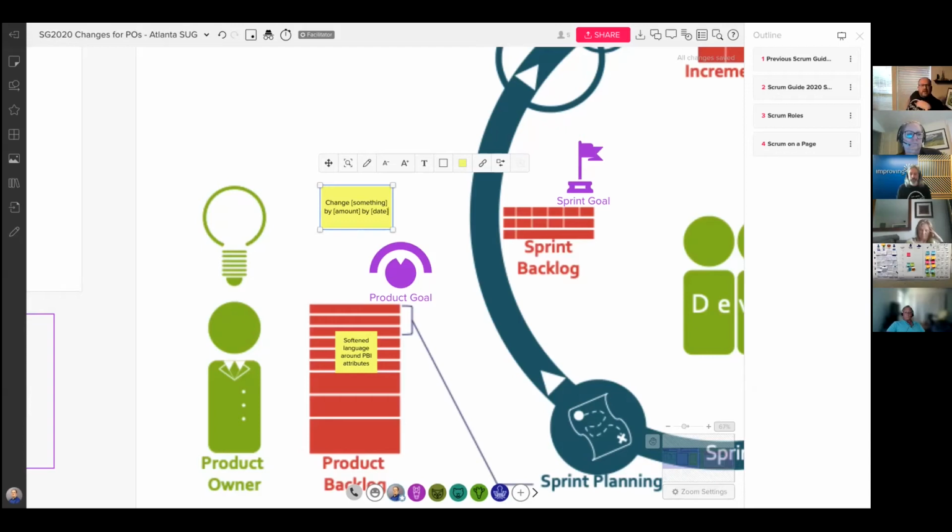It's something that we can see in the next 6 months. That's usually my time frame as a product owner. Scrum Guide doesn't say much around that, and it shouldn't. But 6 months to a year is what your idea of the product backlog or your product goal should look at. And if you have product backlogs that have items in there that are going to take longer than a year, you've got another problem, I'd say. I found it very difficult to manage a backlog that had things that are going to come out 5 years from now. You're talking thousands of things at that point, right? So keep it clean. I found 50 to 100 items were good for the next 6 months to a year. Not much more than that.